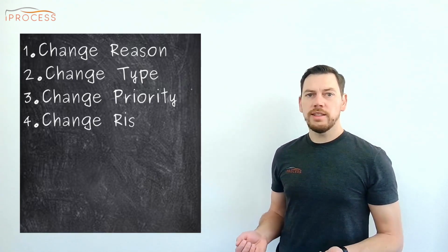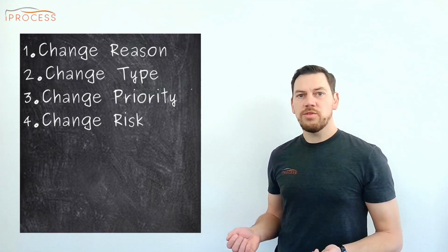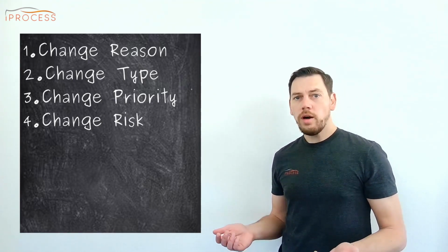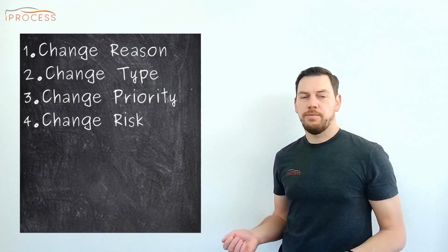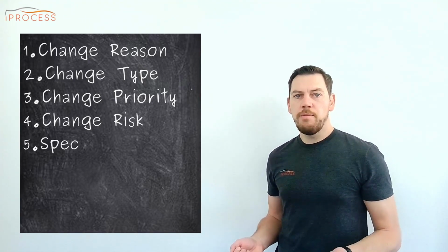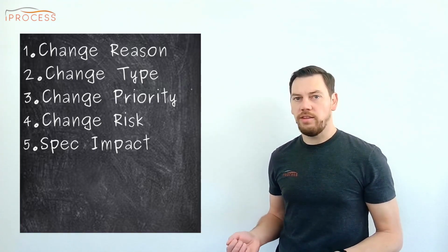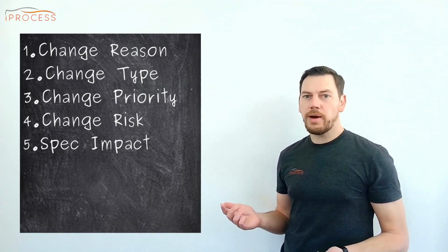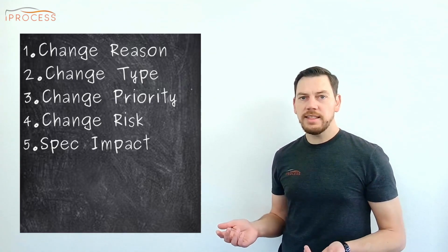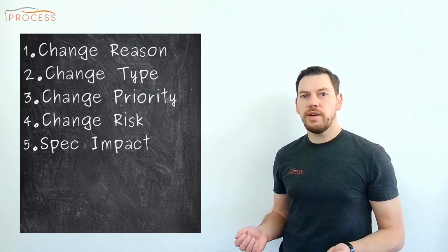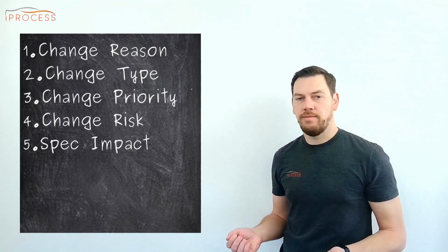Fourth, risk of the change. Can this create significant build break, a minor user visible issue, or only non-visible effects? Fifth, impact on specifications. What is the impact on your specifications on all levels, from the highest level of requirements over safety analysis in case your project is safety relevant, all the way down to software requirements and detailed design?